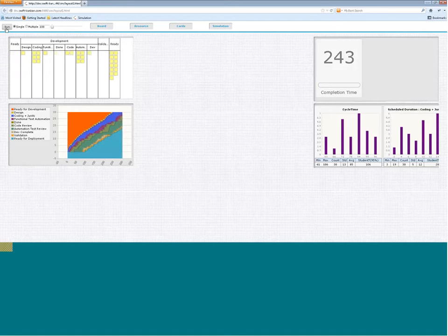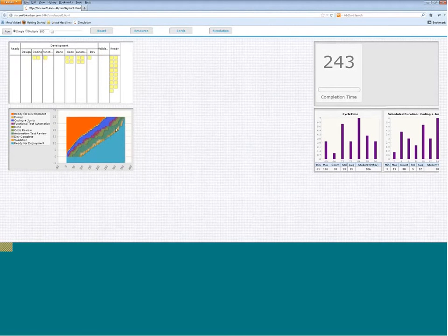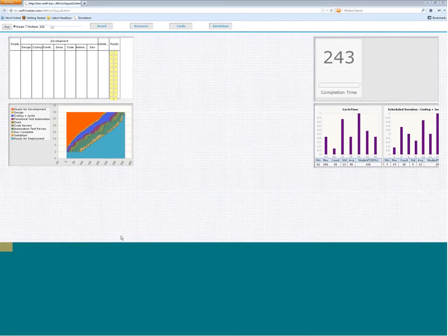Okay, so these are all the kind of scenario planning that you can do, and for work distribution, this perhaps gave you almost the best optimal result, as you can see, because pretty much all the lanes are fairly evenly distributed in this. Right, this is the green lane, which is the automation test review lane. This is the coding lane, which is where the next heavy time concentrations were spent. So you are able to get a fairly evenly spread execution by doing the resource distribution this way.